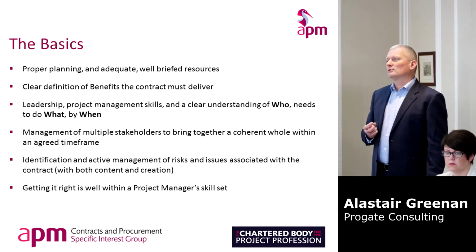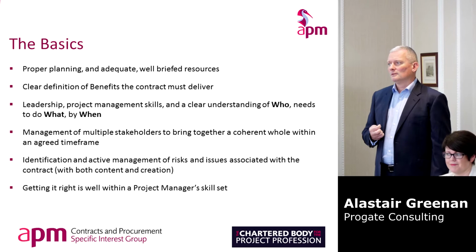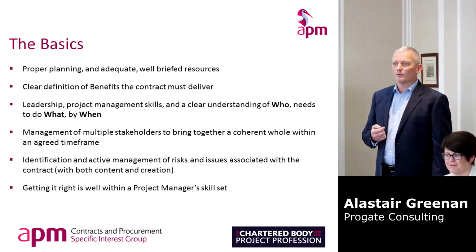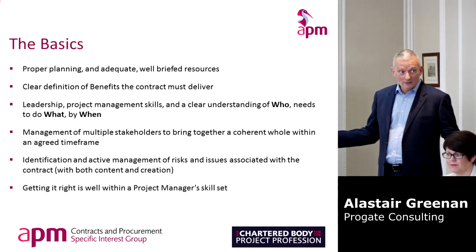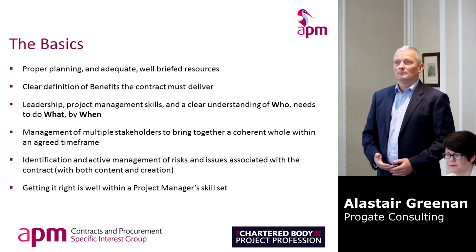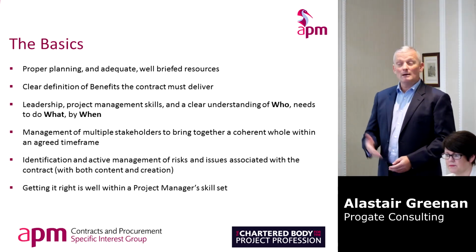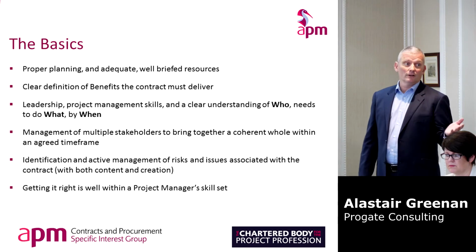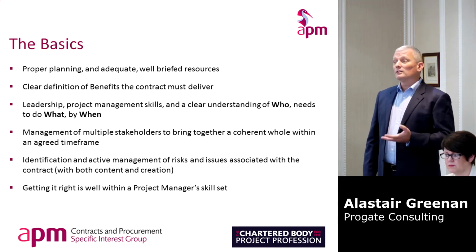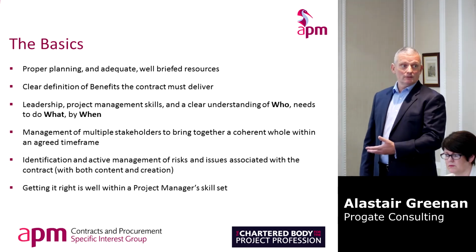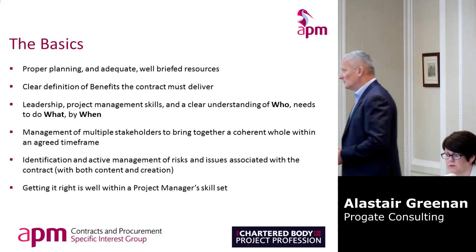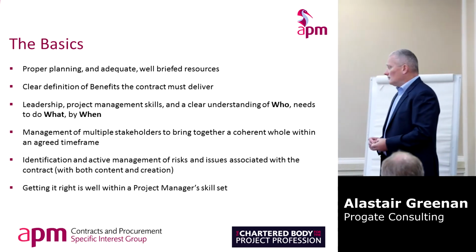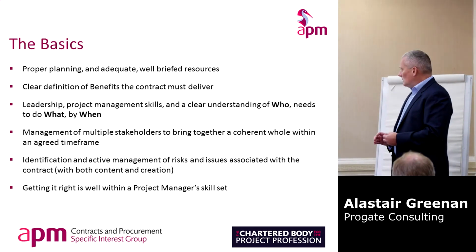Who knows what a risk is versus an issue? A lot of people get confused about that. A risk is might, an issue is. That might go wrong, it is going wrong. That might go right, it is going right. So risks can be opportunities or threats, positive and negative. Yeah, and you need to consider both of those in forming your contract.